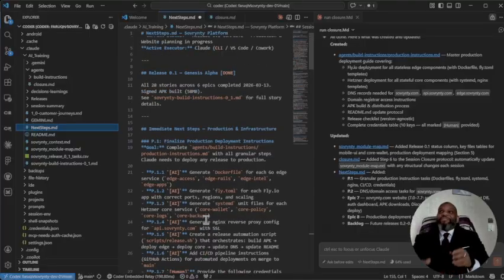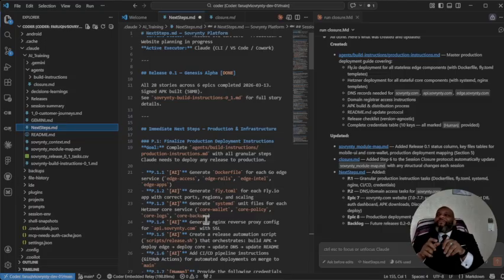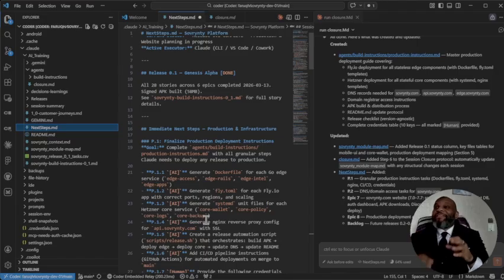Now, when you create this to-do list, to understand scope creep, this is crazy. You put your scope creep inside here and tell it to add it, and then you can ask it to estimate and re-baseline the project based on that scope creep. It'll update your project management software and your Gantt chart so you can see it. If you want, you can have it spit out a report and email it to you. At the end of it running, you just go to your email and see: the project increased by 2 days, the project increased by a day, and here's exactly why.